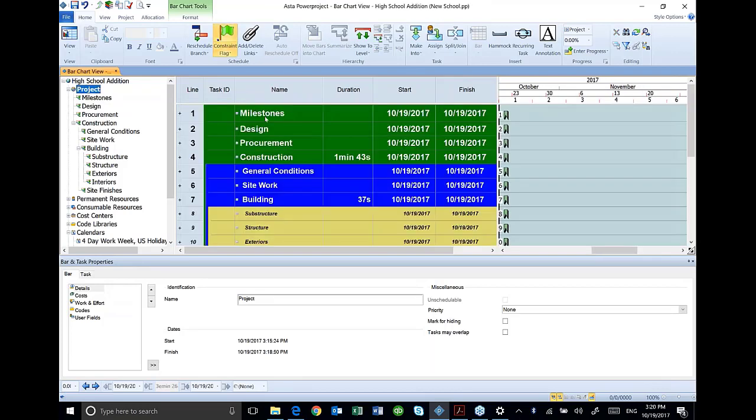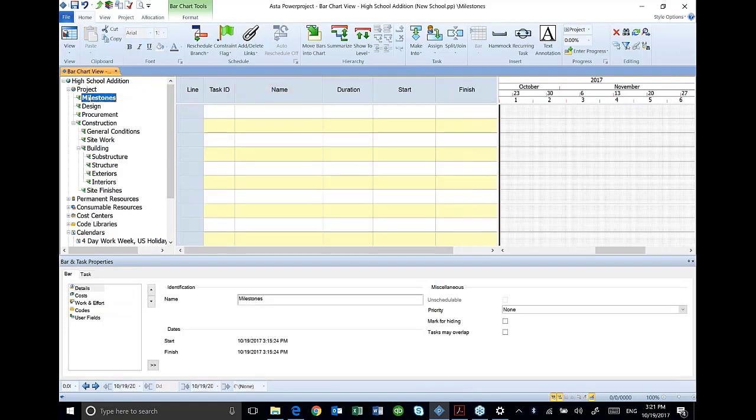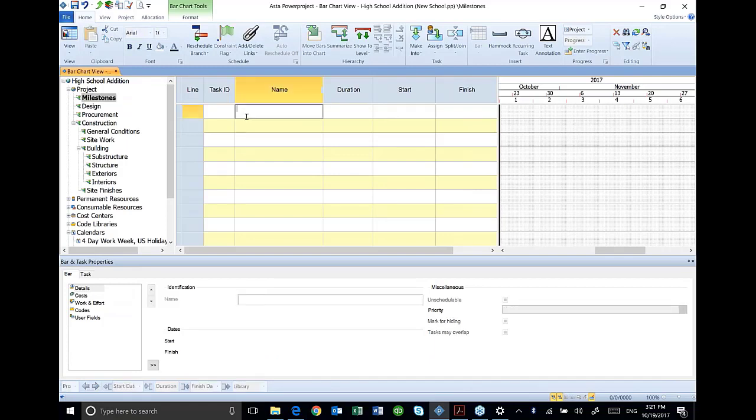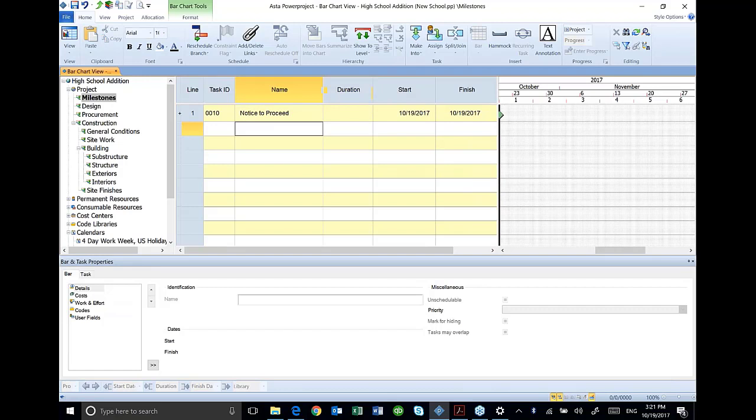Once again, my project outline has all of the headings in it, but if I add activities in this screen, it's going to add them actually to that project. So if I want to add activities to the milestones section of my outline, I'm going to click on milestones and then just add the activities in here, and they will be assigned to that milestone. And I'm going to make a duration of zero, and ASTA will automatically recognize that that activity is a milestone.